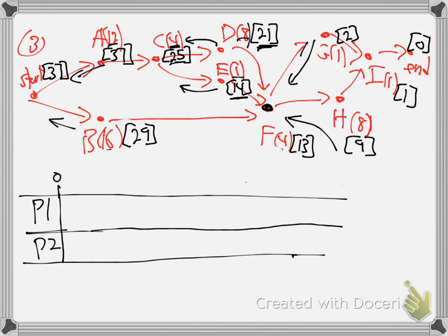So again, we're looking at the bracket numbers now. What does the bracket number tell me? It tells me how much all the things to the end add up to be along that path. Right? That's the whole critical path method. That's what the bracket numbers are. The 12 is how long job A takes. The parenthesis number is just how long job A takes, 12 hours. But the bracket number is how long all the jobs from A to the end add up to be. It tells you how critical that path is. The bigger the bracket number, the more work there is down that road to the end, the sooner you should start on that road. That was the wise way to schedule. Yeah, so we start on A, not B.